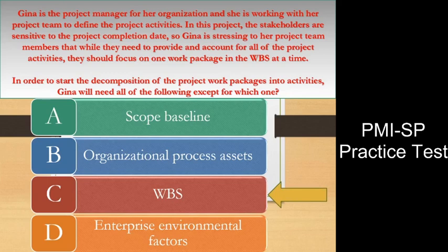Answer C. Explanation: According to the PMBOK, Gina will not need the WBS directly, but will rely on the scope baseline. The work breakdown structure, WBS, in project management is a tool that defines a project and groups the project's discrete work elements in a way that helps organize and define the total work scope of the project. A WBS element may be a product, data, a service, or any combination. WBS also provides the necessary framework for detailed cost estimating and control along with providing guidance for schedule development and control.